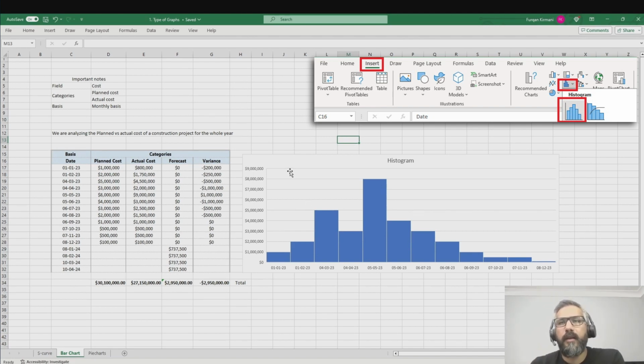For me, as I'm using a field here as cost, you can use any field, but only one field, and categories are also limited to one. So if I see this graph, I can see that these 2 months, March and May, are basically the highest progress months. So I should be monitoring these 2 months very carefully, and I need to analyze it, because if these months are delayed, my project will be delayed. Most probably my project will be delayed.